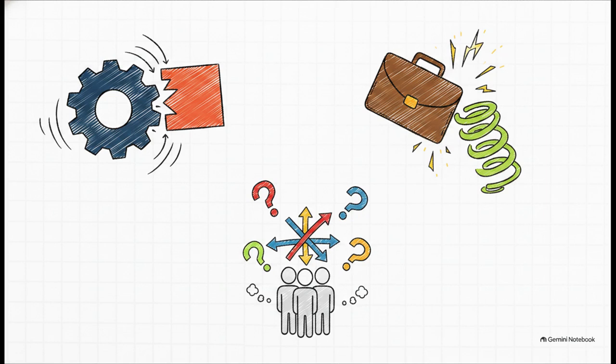But change is never completely seamless, right? Throwing dynamic agile practices into a traditional sequential organization causes a whole lot of friction. Researchers Boehm and Turner actually identified 3 major clash points here. First, the development process differences themselves. Second, how developers interact with business leaders who are still expecting those rigid traditional updates. And third, the people. Suddenly, individuals have to adapt to cross-functional, self-organizing teamwork, which can be a huge cultural shock.